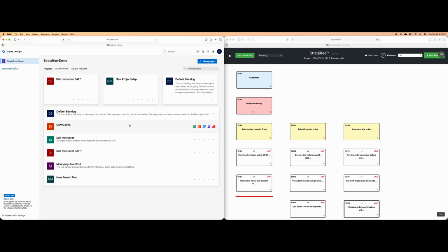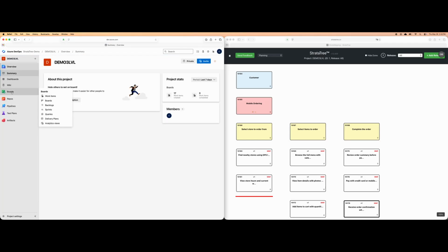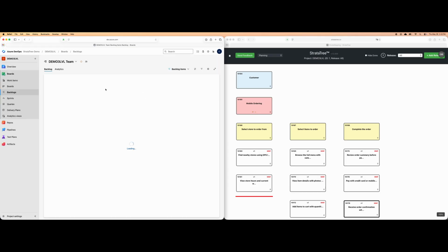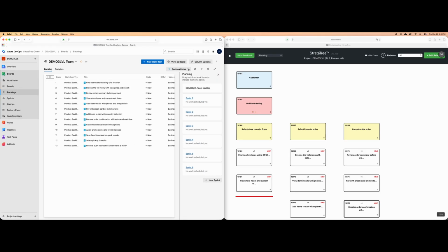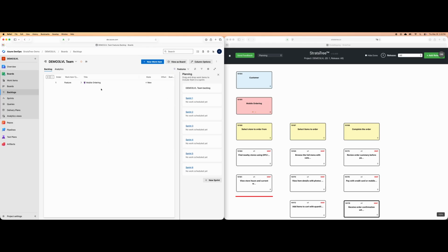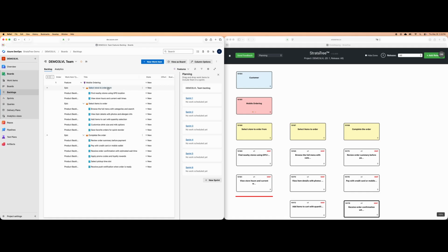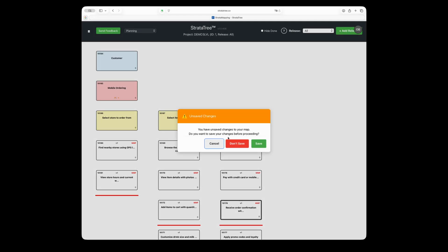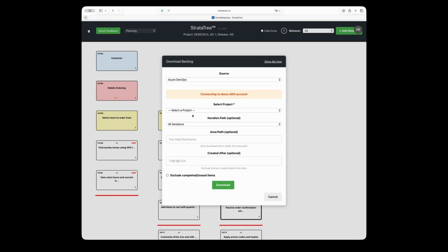In the backlog items view, stories are prioritized by row, then column under the feature's Strata map, with MMF stories first. The MMF attribute is also saved as a tag so you can filter by MMF stories in a specific release. We can also view the backlog hierarchically by feature, with the Strata map structure reflected directly in Azure DevOps. But the order of the stories in the backlog items view is the optimal implementation order and isn't bound by the hierarchy. That is the power of Strata Mapping, turning a typical backlog that looks well organized into an optimized,